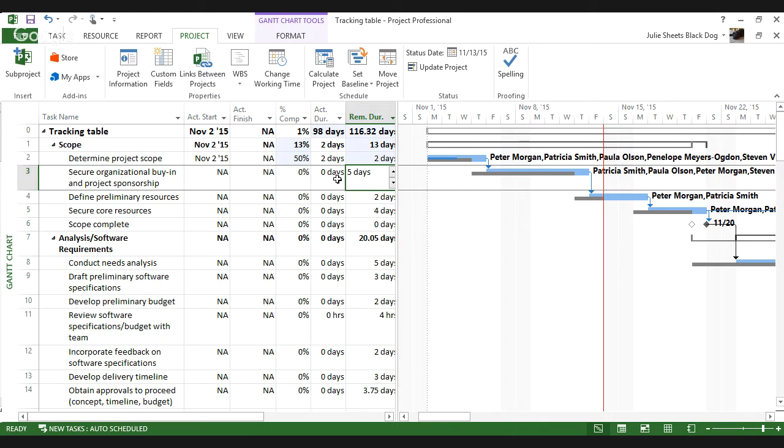So Project has dropped my percent complete to 50% because now I'm only 2 days out of a total of 4 days versus 2 days out of a total of 3. And very importantly, it's projected the new finish date for this task because I'm projecting I'm going to finish this task 1 day later, and this task was a predecessor to others. Then with that one simple change, my tasks have been updated.